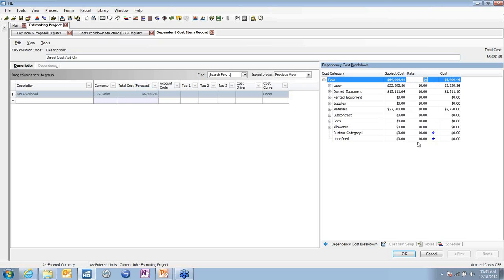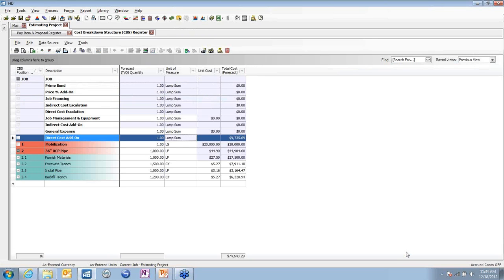And I've already put in a rate there, but maybe I want it to be a 15% markup of all of my direct costs that I see here. And that generates now some indirect costs, some overhead dollars that's going to be added into the project. I would want to foresee any risks at all possible, so I might create a contingency kind of bucket for my indirect costs, which I could do here as well.